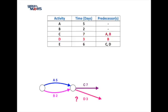The next task is activity D. We have a problem because according to the table, activity D starts after activity B — there's no mention of A. In our diagram at the moment we've drawn D coming off the same node as activity C, so according to our diagram activity D is waiting on both A and B, but according to the table activity D can start after just two days when B is completed. So we may need to reconsider our project network diagram.